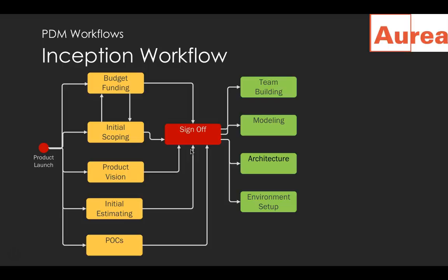And finally, the most important one is to set up the environment. This is where we basically set up the end-to-end environment. And I would even go on to say that at least the first release of CI/CD should be done at this point in time when we're setting it up. Then after that, it's easier for us to incorporate things like agreeing on unit testing upfront. It is futile to go for unit testing in the middle of the product. It doesn't happen.